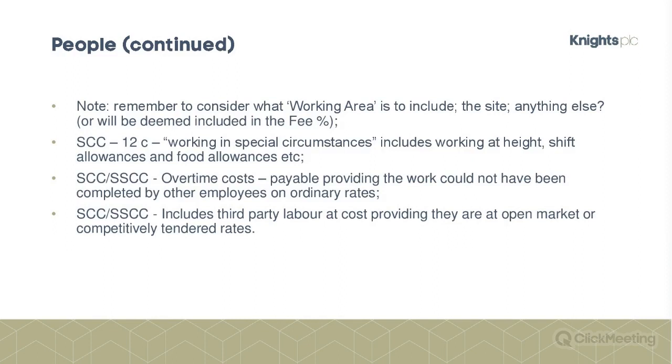Yeah, so just remember to make sure everything is included, because there's a default position that if you can't claim a specific cost under the schedule of cost components, then you're deemed to have included it within the fee percentage, which sometimes does cause people problems.